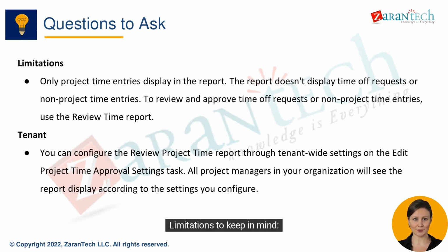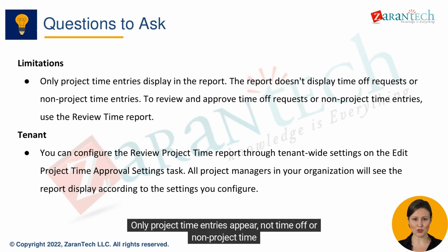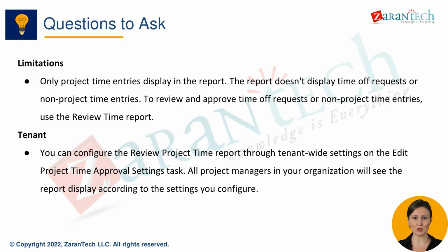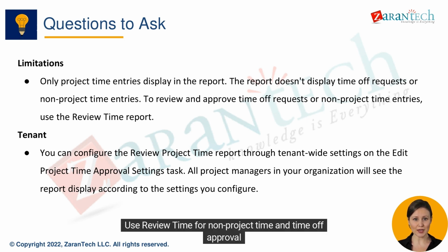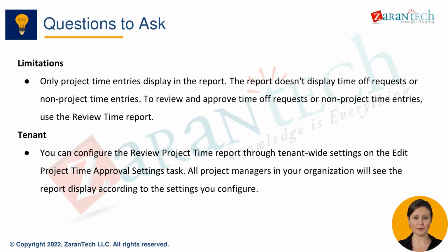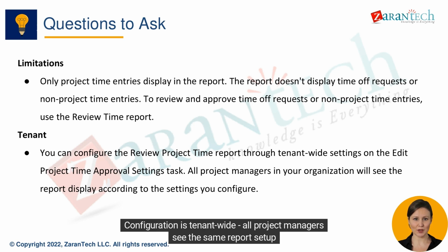Limitations to keep in mind. Only project time entries appear, not time off or non-project time. Use review time for non-project time and time off approval. Configuration is tenant-wide. All project managers see the same report setup.